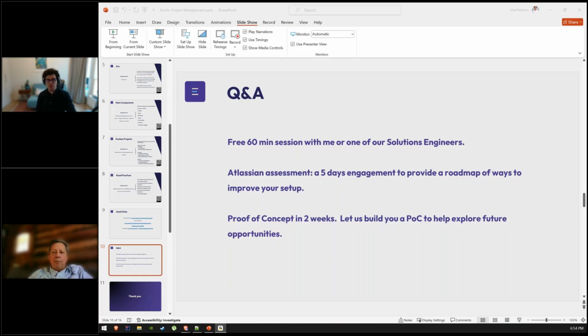Yeah. In my opinion, the goal of story points is not to estimate perfectly each story, each sprint, but to look at a larger period of time and estimate that. For example, you have a huge amount of work, a project with 1,000 story points. You don't actually care if people delivered X amount of story points in sprint 5, but you would care that the average is quite close to the actual truth. What people estimate is actually close to the actual truth on a bigger scale of things. So that you know, can I finish this project in 6 months? On average, yes or no.